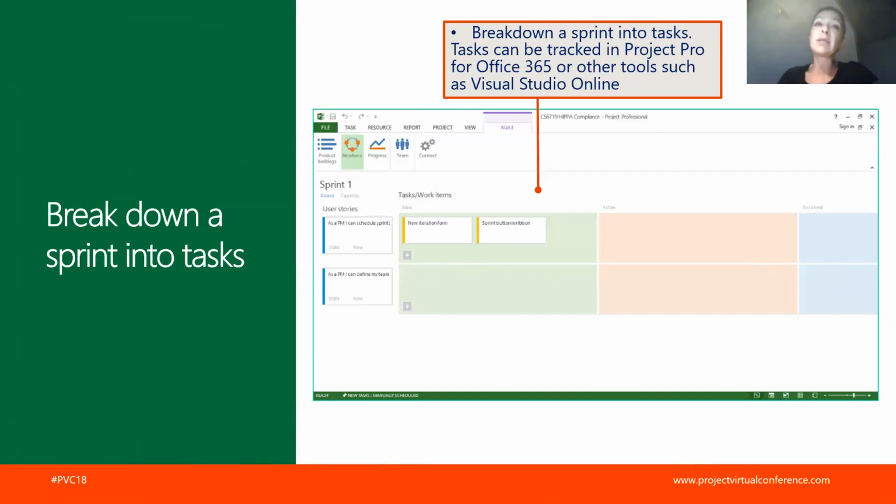Those work items can be tracked directly in Visual Studio, can be closed directly in Visual Studio, and through the connector, we will be able to see the updates in MS Project. Updates meaning both working hours versus actuals, dates, and of course, situation of replanning of those dates in case needed, or in case of additional information given through the Visual Studio tool.